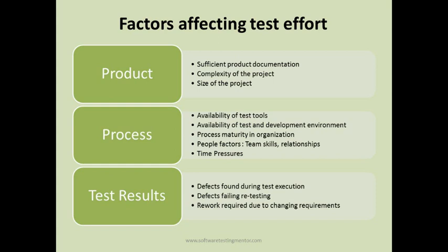Then any rework required due to changing requirements. In case rework is required due to any changes in the requirements, for example, the requirements were not clear or incorrect, then if there is any rework involved by the development team, that needs to be tested, which in turn will affect the test effort, and more testing will be required to test those changed requirements.